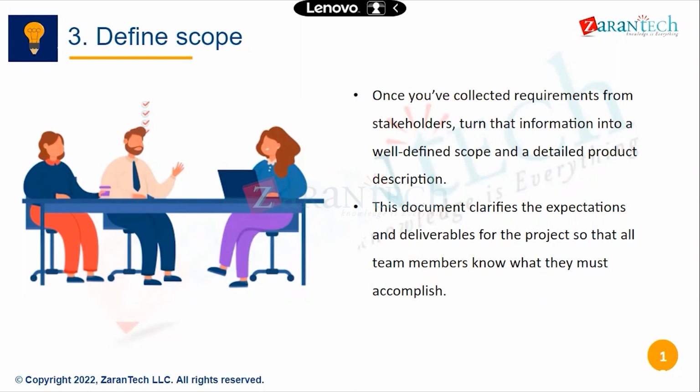Right? Therefore, here we have to identify what, when we are starting the project, when we are stopping the project, what is the business process to be added, what are the assumptions to be added, what is the time frame, what technology we are using, who are the customers or stakeholders, what type of geography this product is going to serve, and what is the start and end date of the project. All these we should add as part of this. And again, we have to baseline the scope for the project. And baseline means you should get it signed off from the client. Like this is what we do as part of version 1 or version 2. Okay. All these we should add as part of project scope.